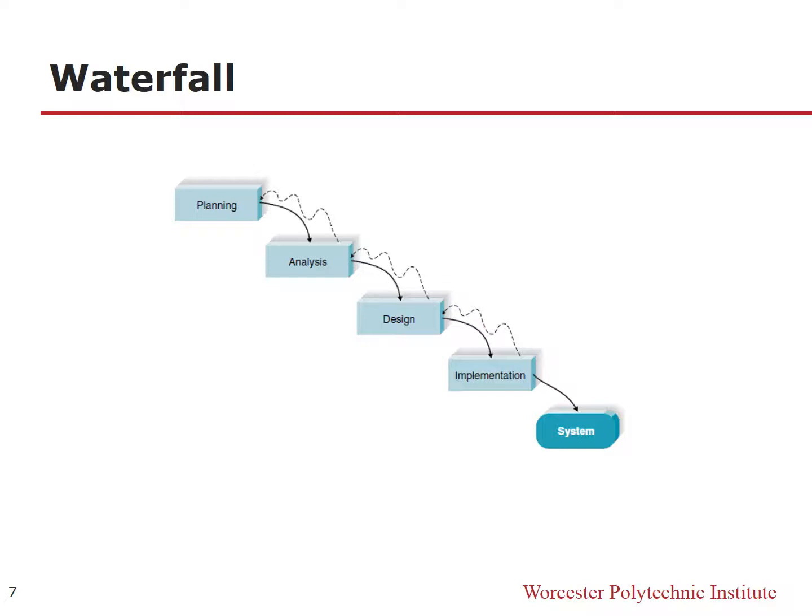And if the business side says, oh, we want new functions in the system, during the implementation when you are already coding the system, that will disrupt all steps, and most likely the deadline will not be met. You cannot catch up with the deadline because you have almost finished the coding, but there are changes, and you will have to rebuild everything from the beginning.